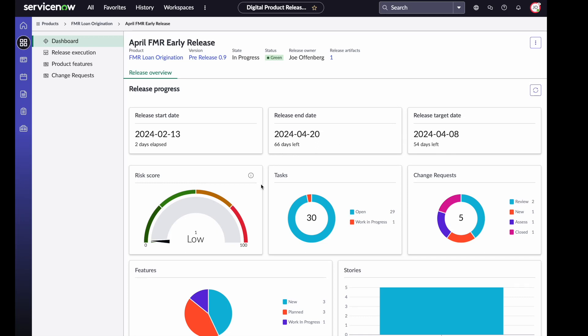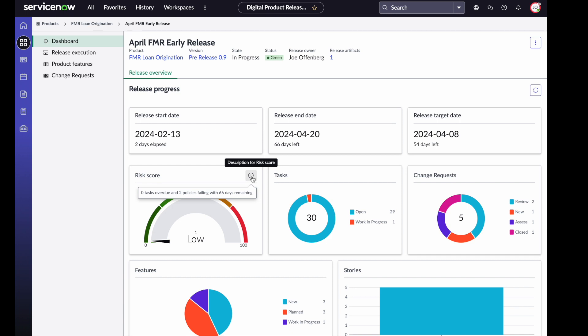That's really what this date is tracking, is that go-no-go date for the release prior to deployment. We can also see things like a risk score. This risk is quite low because we are at the very beginning of this release. The risk is calculated by taking how many tasks are overdue and also how many policies are failing, how many are non-compliant. But that is balanced by how many days we have left in this release. While yes, we have two policies failing, there are 66 days remaining. So we have plenty of time to get these policies compliant. The closer we get to the end of our release, the higher the risk score becomes.